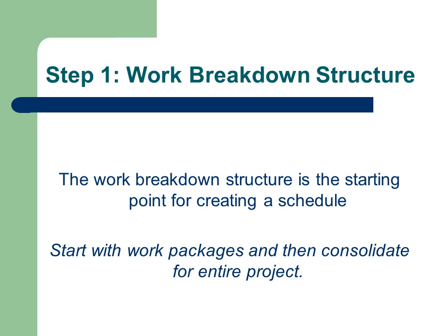The work breakdown structure is the starting point for creating a schedule. Break each work package into activities and create a schedule for each work package. Next, add in any dependencies between activities in different work packages in order to create a schedule for the entire project.